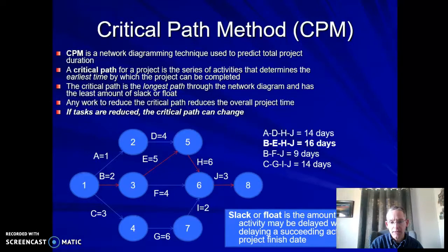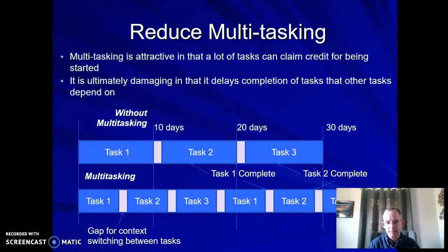So we talked a little about critical path. Critical path method, remember this as we go forward. This is important. This is how you determine, when you're trying to crunch the schedule back, you can reduce the timeline, you can reduce the slack, you can reduce some things, but you can't reduce the work that needs to get done. So you've got to figure out what is the line of tasks that I need to work on the most. If I'm going to put more people on it, what is the line of tasks that, if I reduce that one, it'll actually reduce the length of the project? If I reduce any of the other tasks that aren't on the critical path, it doesn't matter. The critical path is still going to push me out to the same time of completion. So critical path method is the key way to look at that.